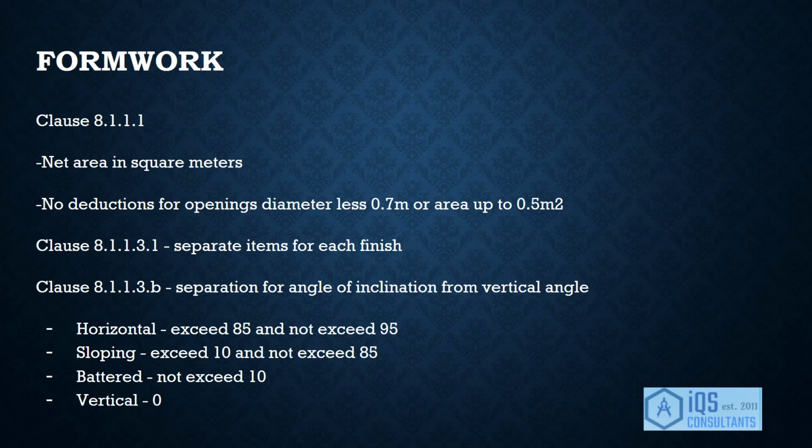Clause 8.1.1.3b states that separation is necessary according to the angle of inclination from the vertical angle. This was earlier spoken about by Sajjad. The four angles of inclination are horizontal, sloping, battered, and vertical.